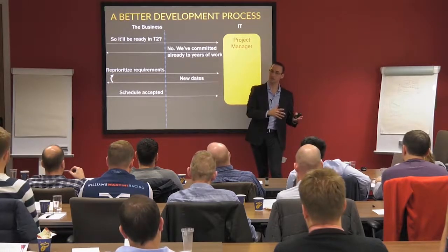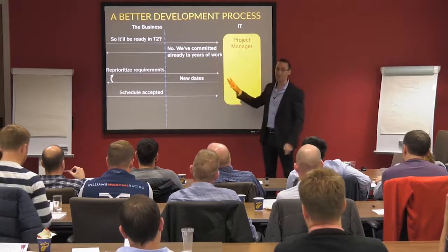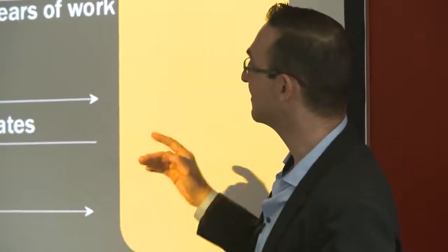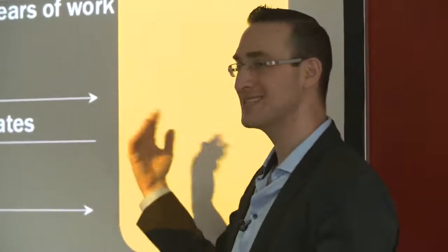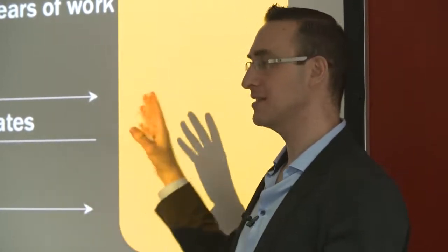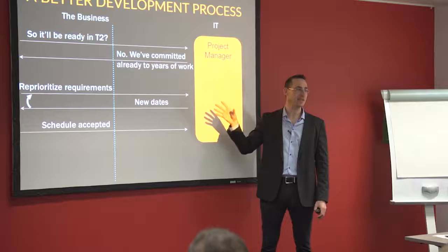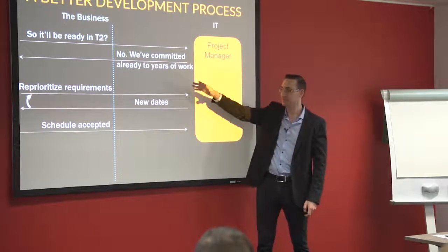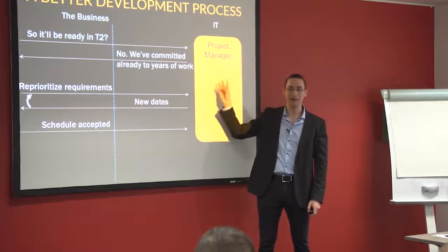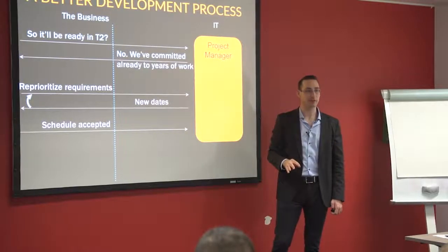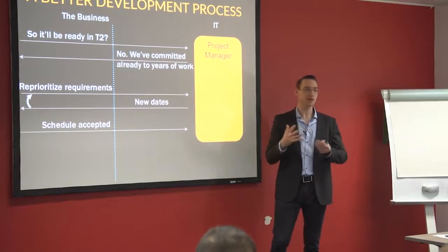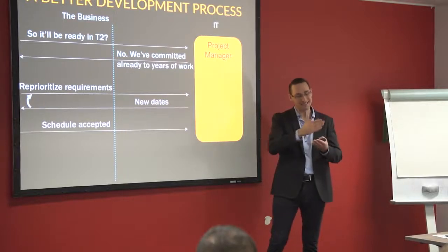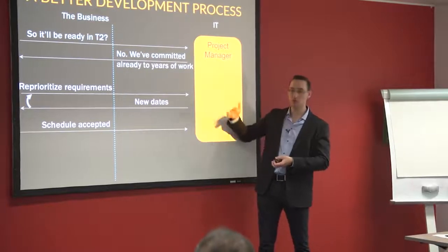That's where we start. All of this can happen in parallel to the development of all of the previously accepted requirements, right? This doesn't mean that the team is just sitting there idle waiting for this stuff to happen. We can continue doing work on the accepted schedule from before while all of this haggling is happening in the background. So it's not in conflict. It's not phase-gated in the sense that you don't do the work until ultimately the schedule gets accepted.